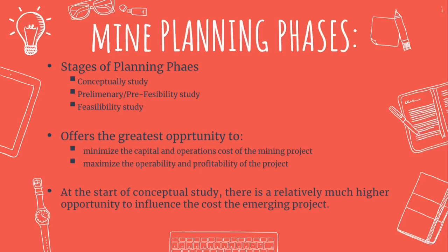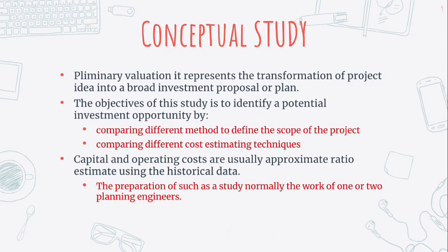Mine planning phases. The planning phases consist of three basic stages: the conceptual study, the preliminary or pre-feasibility study, and lastly, the feasibility study. The mine planning phases offer the greatest opportunity to minimize the capital and operations cost of the mining project, and maximize the operability and profitability of the project. At the start of the conceptual study, there is a relatively much higher opportunity to influence the cost of the emerging project. The first stage of planning phases is the conceptual study.